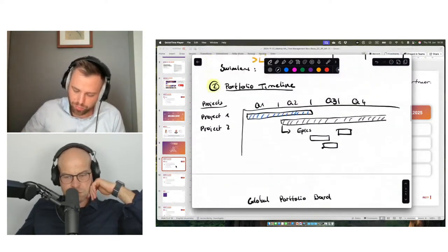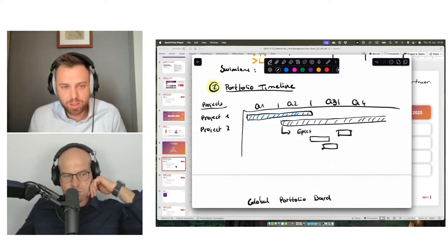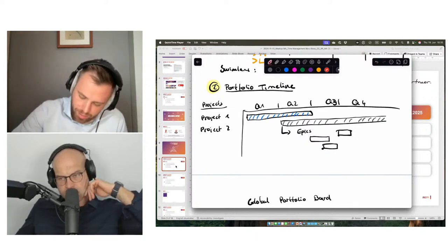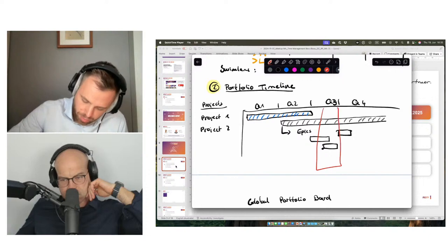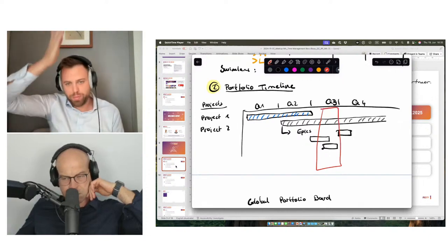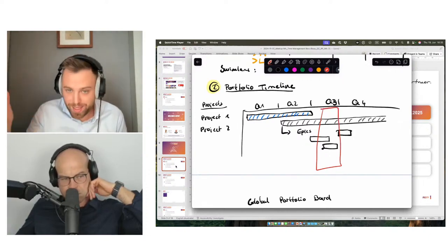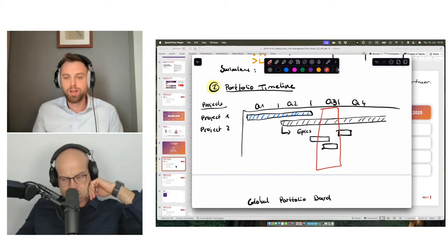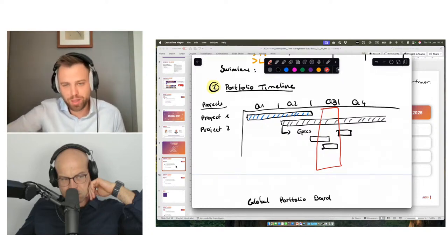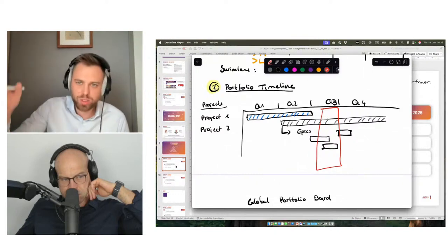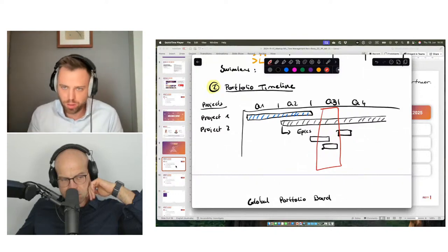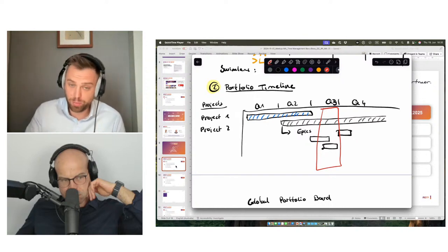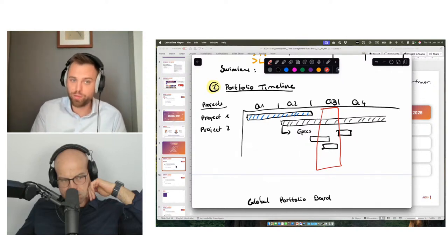I mean, you can imagine if you have here in a department, let's assume 20 projects, and you now look into, for example, this month here, and you see, okay, look, this is very full. There are a lot of epics, and all the epics are only done by the same 2 people, as an example. We are coming towards a capacity problem. Now a new project should start in the same quarter with a lot of new unknowns. Can we actually do this? And that's where it's very helpful from a department perspective to have a look into it.